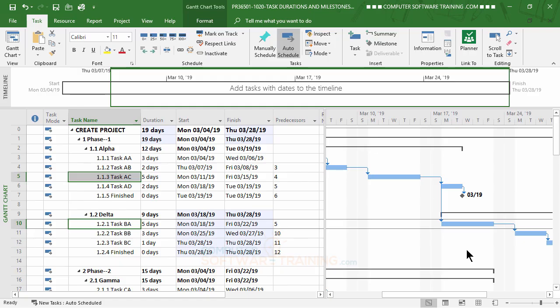So up to this point, let's just do a little review here. When you set up your project, make sure you put your duration in, as far as your days or hours, whatever it happens to be. And as far as your dates go, you don't touch those, okay? You let these relationships we're setting up drive the dates, push the dates, that type of thing.